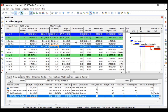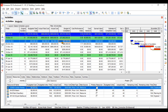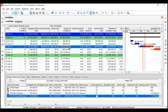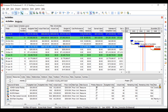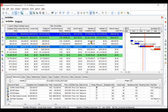Budget at Completion is the budgeted amount for the total work — it equals your budgeted cost. For a particular activity, how much you have budgeted is your Budget at Completion. Ideally, at completion of activity one, you should have spent only 26,000, which equals the budgeted cost. It does not depend on actual completion; it is simply your initial plan — just add the budgeted cost for all resources.